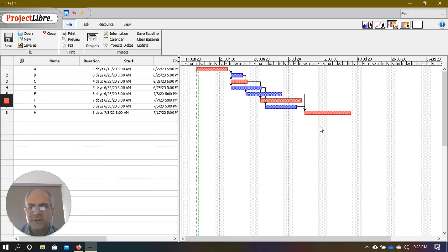So the duration of the project, as I mentioned in the previous video, was 24. So that 24 is basically the working days, and this 24 plus these weekends, the additional 8 days added to 24, signifies the calendar days here, right? So it is a bit longer on the calendar and it is much shorter as far as the working days are concerned, right? So this is what the Gantt chart looks like.